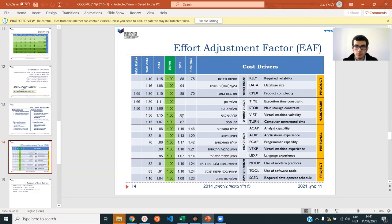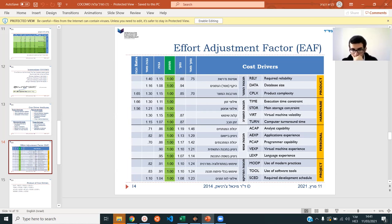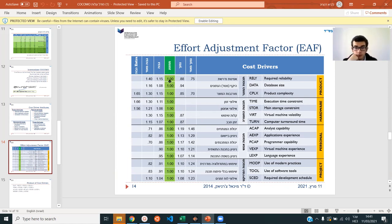Notice that one of the entries is the average — if you have average product complexity, you just multiply by 1 and it has no effect. After you answer all these questions — whether it's high, low, very high, very low, or average — you then calculate the EAF.